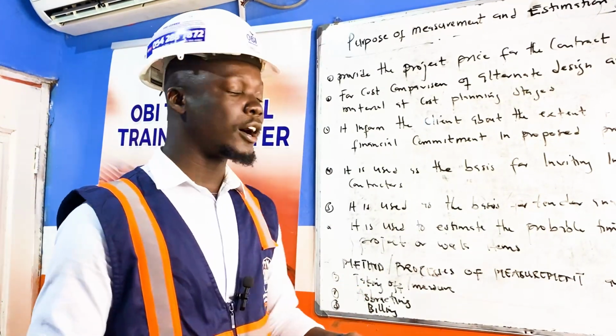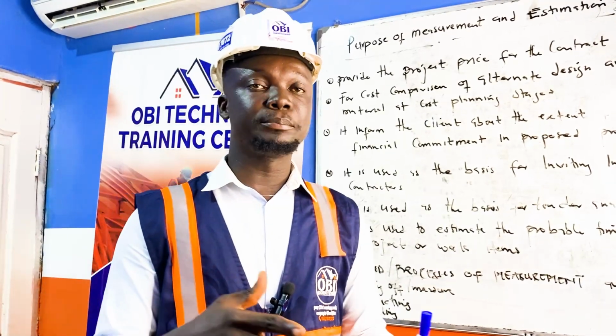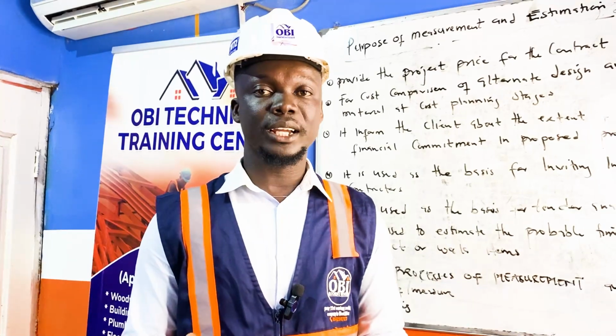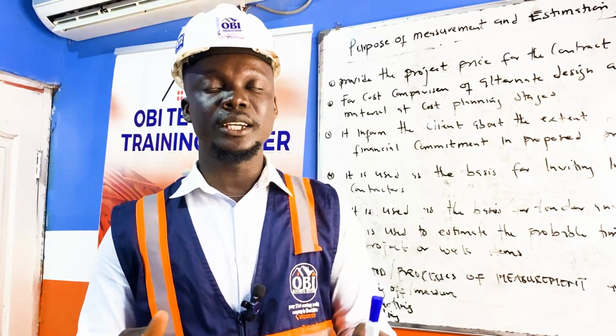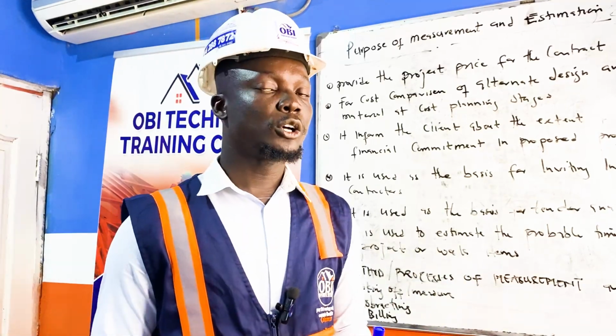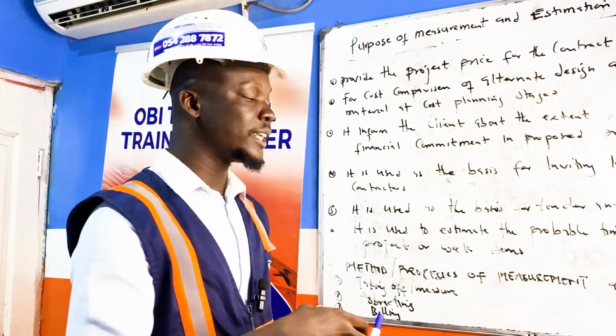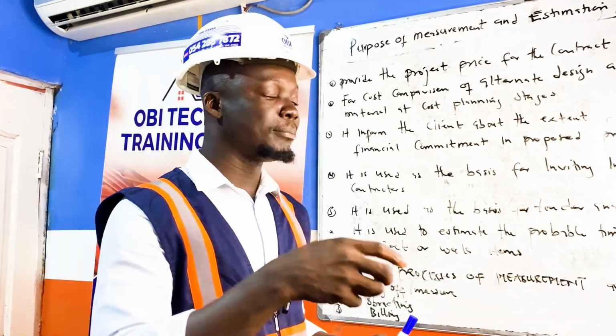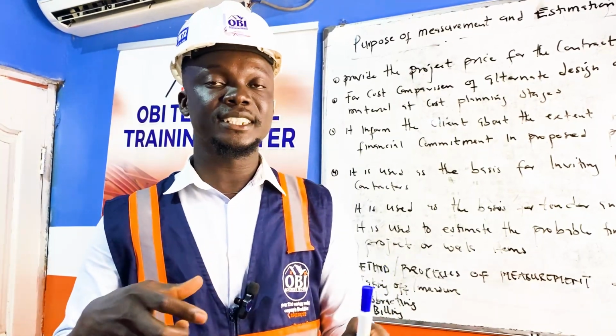Then we go on to do the abstracting. For the abstracting, it depends on the trade work that is going to be executed. So we have trade work like masonry, carpentry, maybe ironmongeries. We have tiling works and all those things. So we pick the abstract from the taking off. That is the accumulated quantity that is taken from the drawing or from the specification that is given.